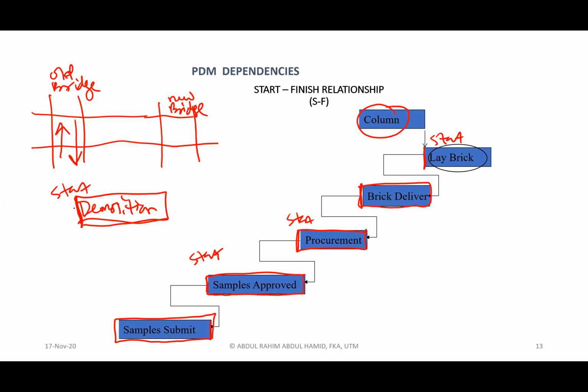So you see, this relationship is like this. The start of demolition can only commence, begin, when the new bridge construction is already completed.